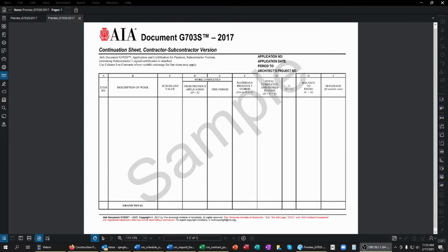And because your pay application is just the summary and culmination of all of the ancillary documents, I'm actually going to begin with those, starting first with the Schedule of Values. Your Schedule of Values is an itemized list of your complete scope of work with the value of each item listed next to it, which will sum up to your total contract amount.